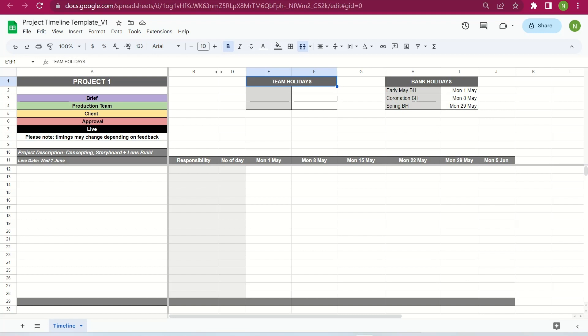In this small grid I've added team holidays, so you can note whenever someone from the project team is going on holiday — you'd know if you need someone to cover, or if you need to hire a freelancer for that week so the project still hits the live date. It's also really important to note bank holidays in your timeline, so you don't accidentally schedule client feedback on a bank holiday when no one is in. It's better to do this at the start of timeline creation rather than halfway through, when you realize you've based the whole timeline on feedback being due on a bank holiday.